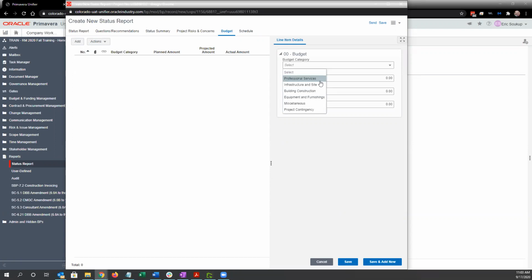Because we're not entering the budget in the budget BP in terms of planned, projected, and actual, we're entering it here as well. And the breakdown is different from the cost code structure as well. So the other reason we're having you enter the budget here separately is this is also point in time reporting. So, allowing you to be able to generate your quad chart without necessarily having to wait for something else in the system to update, like an approval for a budget change or something.